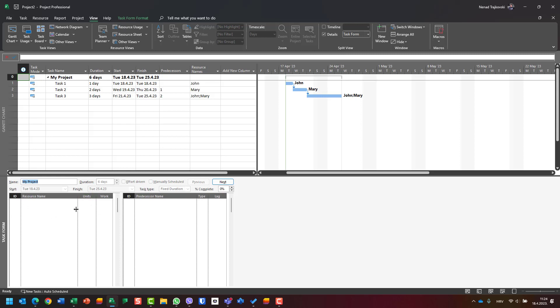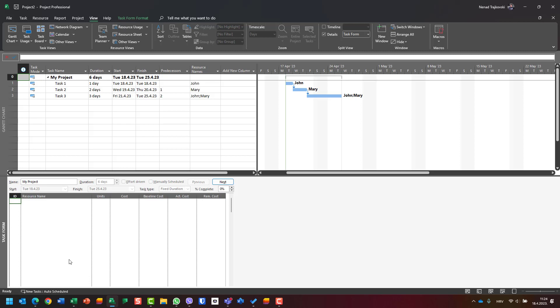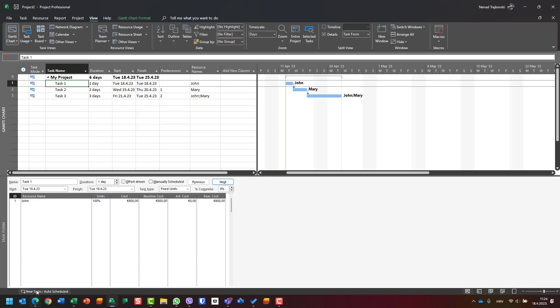This is the default that opens when you choose Task Form. I will right-click here and select Costs. When I go to Task 1, I can see that the cost is 800 euros. Baseline cost is 800, actual cost is zero, and remaining cost is 800.